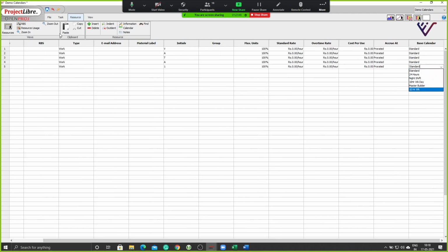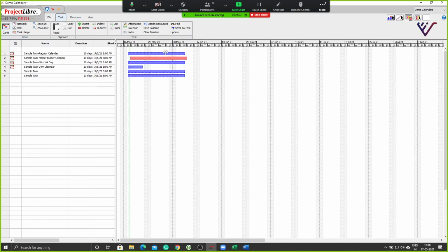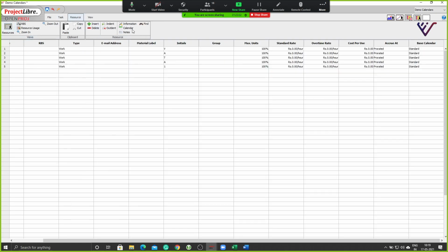I was showing this for demonstration purposes, because when you are implementing the different calendars, you people were asking in the beginning, can I give the number of hours for an activity? Yeah, right. So that question gets answered here. Even though it says 10 days here, the activity is not running for 10 days. It is running for the equivalent of 10 days of man hours. Okay, so the same thing happens for everything else, but ideally it should be applied here.